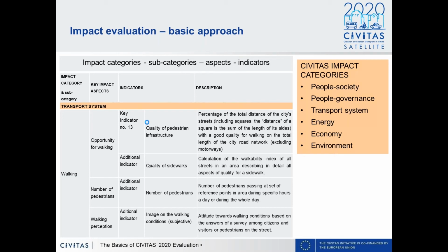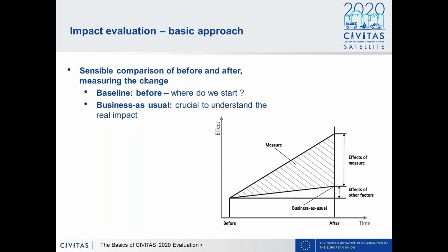Now, concerning impact evaluation, the main thing is that we do a before and after analysis. And I think this is obvious for most of you, but it's still important to remember it all the time. We need, of course, a good understanding of the baseline. What was the situation at the moment we started? And in many cases, it's also important to describe a good business as usual. What would happen after 2 years if we did not implement that measure?